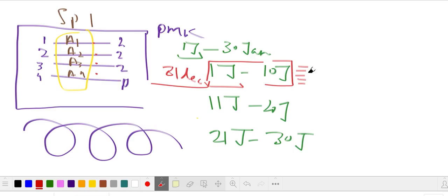So I will plan this sprint in detail, but I wouldn't plan the other sprints in detail. I would just talk a little bit, a kind of high-level requirement.